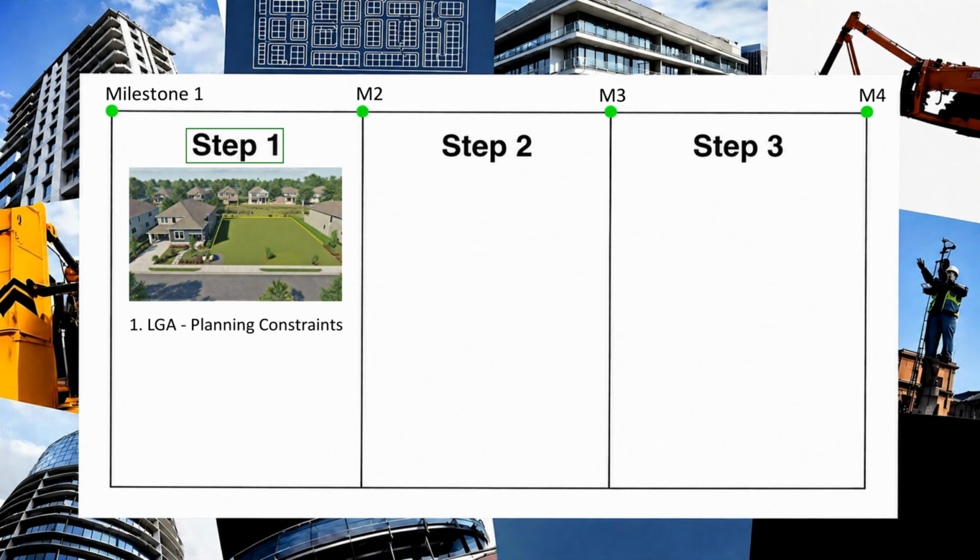For example, site cover, building heights, setbacks, building materials, landscaping, roof pitch, continuous wall length, operating hours, what percent of private open space is shaded, is earthworks necessary, what are the available utilities, telecommunications, underground sewer and water, and any necessary network extensions. As you read through these planning constraint policies from the planning scheme, incorporate them into your design to ensure compliance, or have a sound argument to justify during the approvals process. You will need to do this to obtain any necessary approvals.